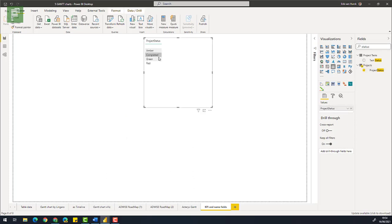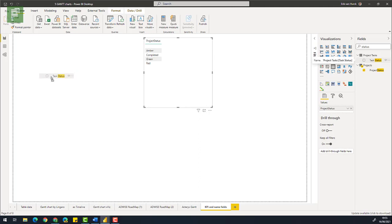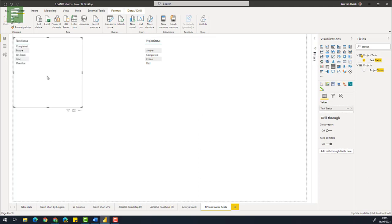Now to know what kind of data is in the project status we can just go in and find the status field and move that in a field where we have a canvas. So there's Amber, completed, green, red and something that is undefined. Then for the task status let's just have it in here as well. And for the task status we have completed, future, on track, late and overdue.